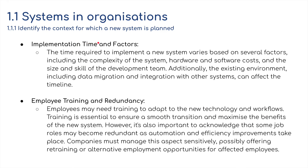We need to look at implementation time and factors. The time required to implement a new system varies based on several factors, including the complexity of the system, the hardware and software costs, and the size and skill of the development team. Additionally, the existing environment — including data migration and integration with other systems — can affect this timeline. If employees need to be trained, and there may be scope for redundancies, there might be job losses.